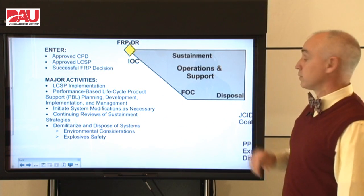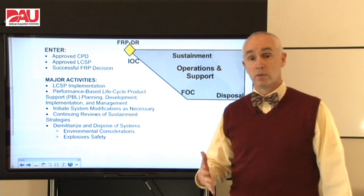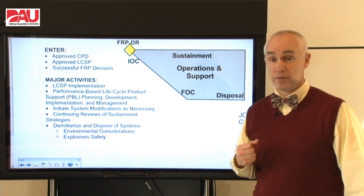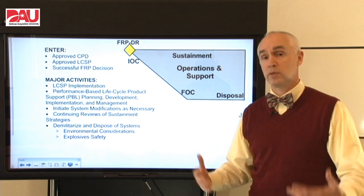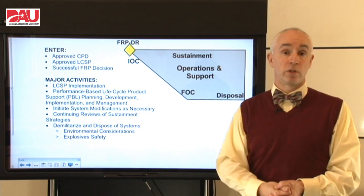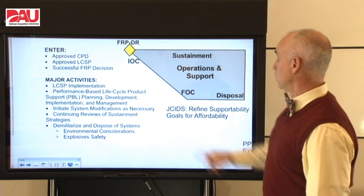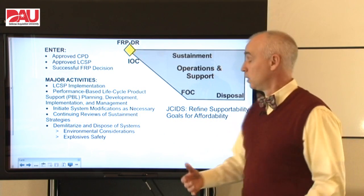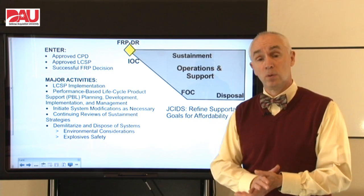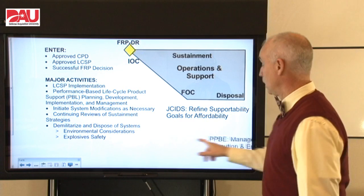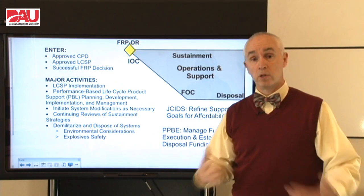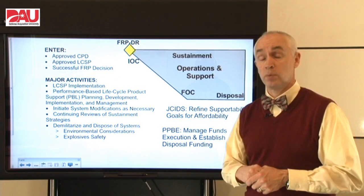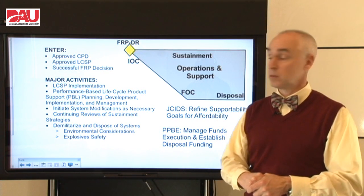At the end of this life cycle, we have to dispose of the system properly. Just like support and reliability, disposal has to be designed in earlier — way back in the TMRR phase, you've got to be considering support and disposal and designing the ways to do that into the system. Within JCIDS, our users are going to help through feedback systems with logistics to refine supportability goals and help drive costs down. We've got to continue to maintain execution of our funding and maintain our funding in the Future Years' Defense Program, as well as look out and see where we need to start putting in funding for disposal. We also have to make sure when we do that disposal that we consider the environment and safety, because most of our systems in the Department of Defense tend to be hazardous.